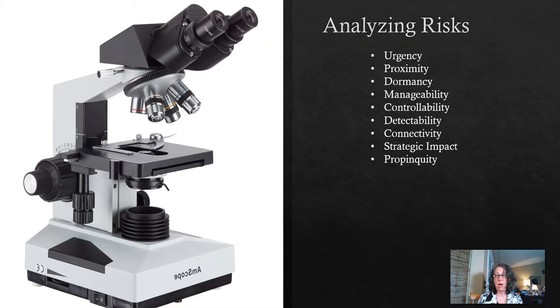what we're trying to accomplish with risk management is, after identifying and analyzing them, the next step is to put into place risk responses to all of those, to pull those out of the 7, 8, and 9 categories and pull those down into a more manageable range, to do things to mitigate them, to do things to avoid those. There are other strategies for dealing with risk besides mitigation and avoidance. We're going to talk about that in the next course.